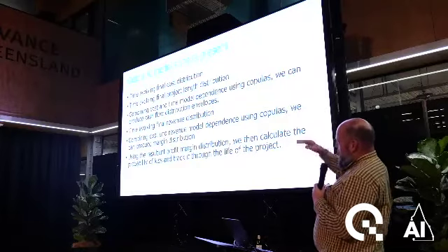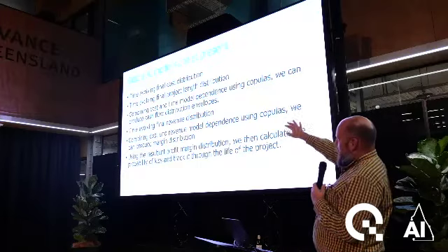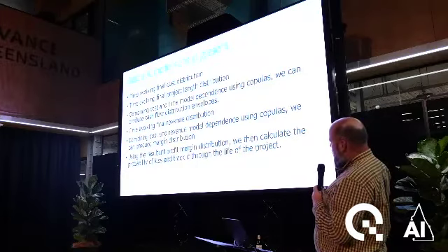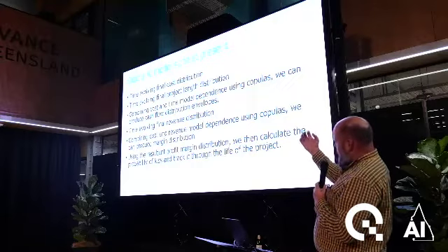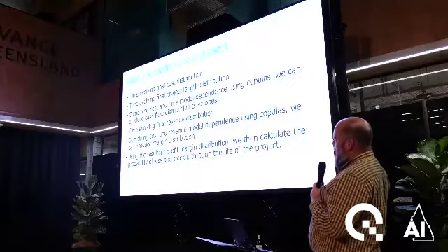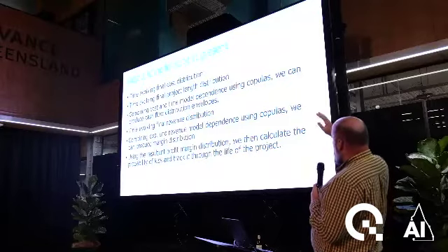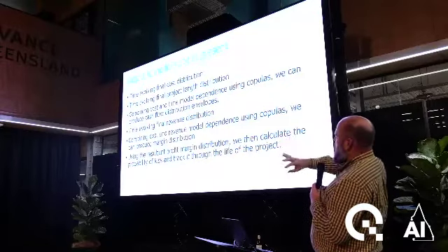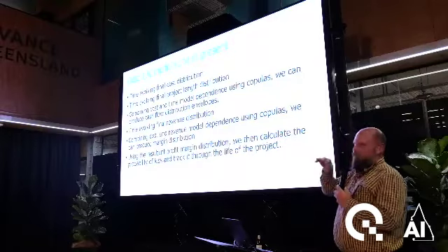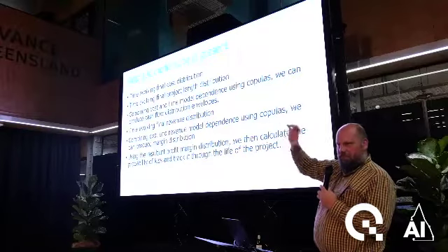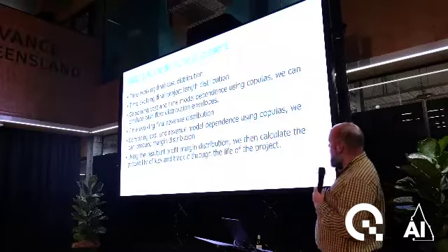But we also have models for looking at the overrun in time, so we can model the distributions in time performance. Then it gets a little more complicated. We can combine cost and time dependence using rank copulas, and then produce a cash flow distribution. So you end up getting these things that you would use in finance, where going through time, this is the envelope of the costs I'm expected to be exposed to going forward.